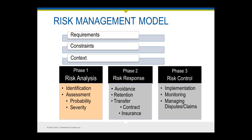Now you've identified the risk and need to assess it. It's important to distinguish what's probable from what's merely possible. Focusing on the probable is less paralyzing and helps you focus on what's important. A realistic assessment should consider both the probability — meaning the frequency — and the potential severity — meaning the cost — of the various risks. Some problems may occur infrequently but when they do, the result can be catastrophic. Other problems may occur frequently but are of minor consequence. The magnitude of risk is a function of the probability of an unfavorable outcome and the severity of the consequences.